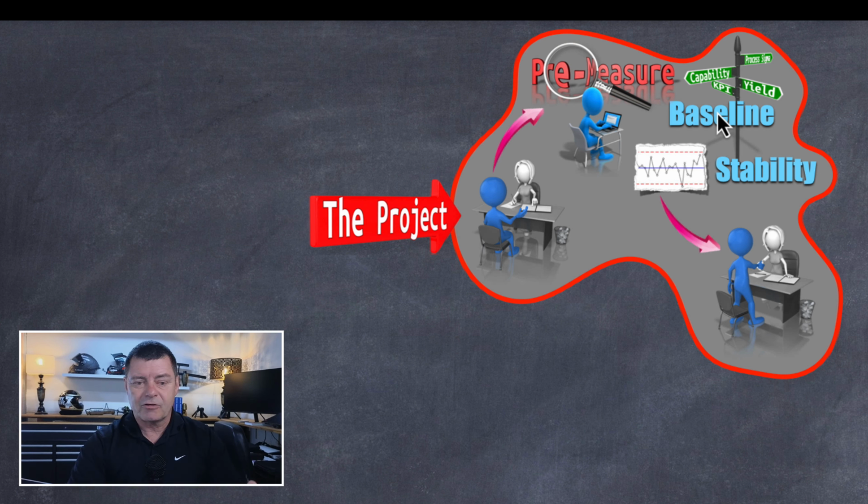I can't control how long a solution takes because I don't know what the solution is. So I develop that plan, then I go back to the third part of this preparation phase, and I sit with the project sponsor and we build an operating agreement. And the operating agreement is basically two parts. What do they need from me in order for the project to work successfully?